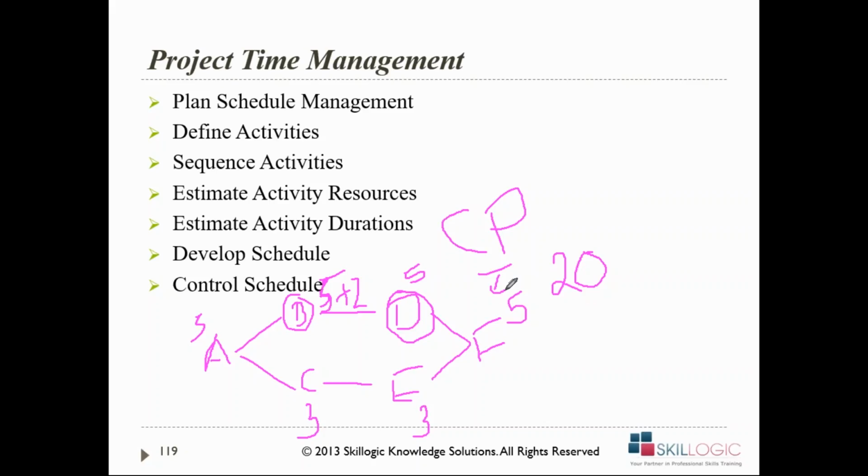Third is, what if, let's say, Praveen is able to do the work faster. Now his colleagues will say, because you were able to do the work faster, next time we are going to get more work or a shorter time period. So they are going to blame Praveen, which means due to peer pressure, Praveen will also not do the work faster. Now, all these are the human challenges, right? Because of which, if one activity gets delayed, the other activities you won't be able to do faster. Overall, the project will get delayed.